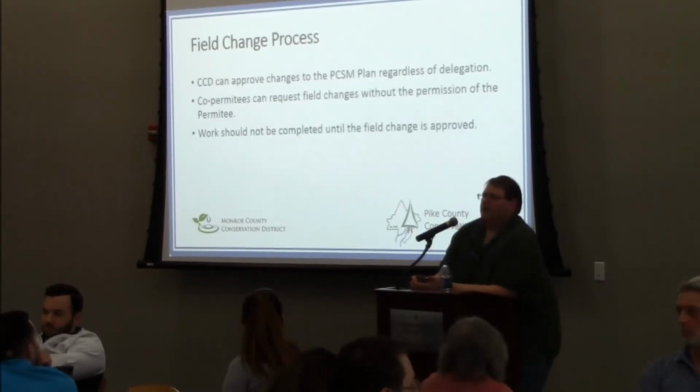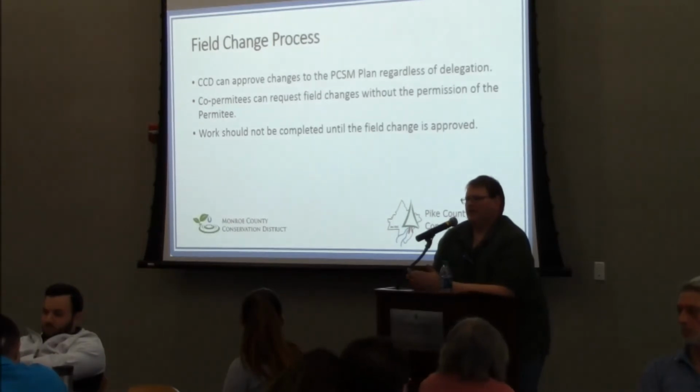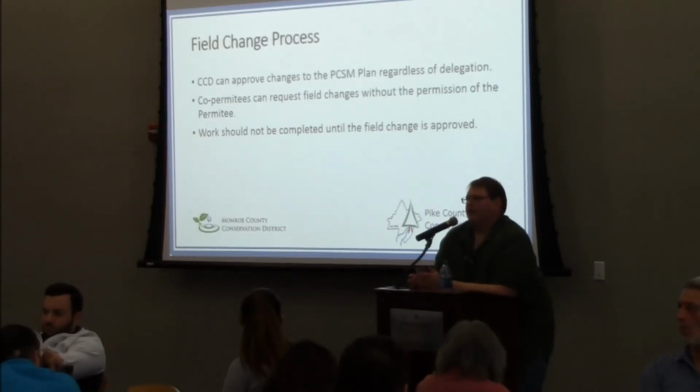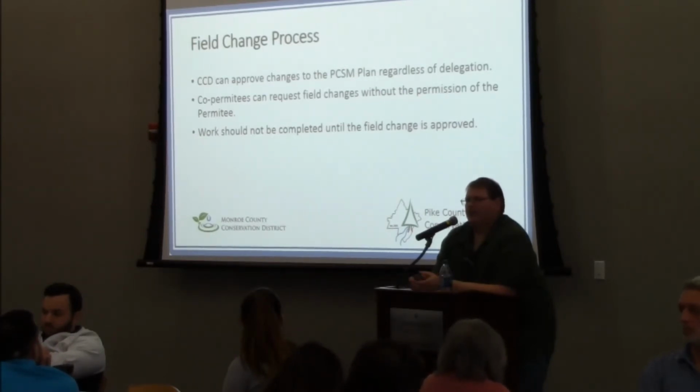Sort of the process here, and each district may be a little bit different, but generally speaking, the Conservation District can give changes to the PCSM plan regardless of delegation. So whether they have an engineer on staff, if they feel comfortable and confident in making those revisions, they can. Co-permittees can request field changes without the permission of the permittee. That's a big one. So your contractor in the field, since they're a co-permittee and considered an operator and have functional control over those BMPs, can ask for a change.